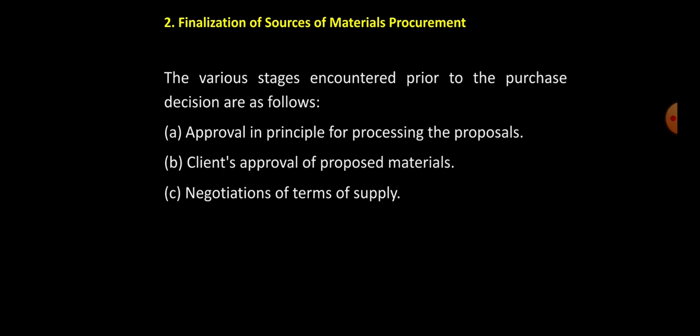Generally, if you see the overall scenario of the industry, a contractor is going to get the material approved which is very economical to him, whereas the client will aim for the material which meets the quality requirements and gives the best performance. One important thing we have to see here is, no material procurement plan can work unless materials are approved by the client. So unless and until there is an approval from the client, we are not going to get any procurement of the material.